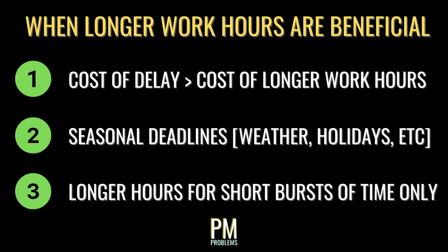Here are a few situations when extending working hours can healthily accelerate a project. When the cost of not hitting a deadline or milestone exceeds additional cost of longer hours, similar to item 1. There's a seasonal deadline to hit that's affected by weather or holidays, or if the extended hours are only needed for a short while, and burnout or productivity loss aren't a risk.